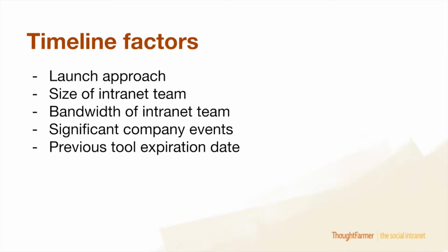Now, this really means how much time are you going to set aside for this project, and what is going to be your target intranet launch date? And the timeline that you're going to come up with will depend on a couple of different factors that you can see here on the screen. First of all, you want to take a look at what your launch will look like, right? What is going to be your approach? Are you going to do a full blast launch where you launch the intranet to everybody in the company on the same day? Or do you want to take more of a phased launch approach with maybe a pilot phase before you open it up to the rest of the company? That will affect your timeline.